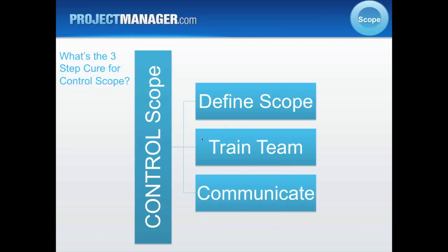But that's different than the project scope. So the project scope identifies all the work that needs to be done to accomplish delivering the product, service, or result of the project. So the project scope is more like the activities, the tasks that need to be done to begin producing the deliverables. So that's a great question. There are two different things, and they have to be identified. Again, both principles apply where it's good to identify what's in scope and what's out of scope for both of those. Okay, do we have another one?